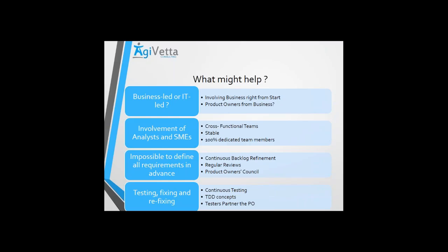That will mean continuous testing, that will mean continuous reviews of what data we are pulling in, that might mean sampling of data sets which is almost continuous, so that you are not stuck at the end, saying oh, we have so much testing to do and maybe these parameters do not work. So you are continuously getting feedback from the people who know about it, right? That's something which is very important.